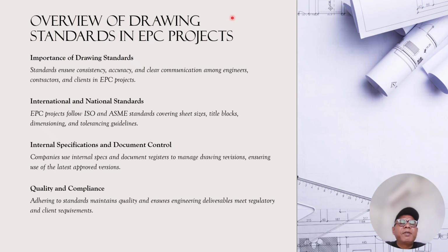So after the coming of EFC, if there is any change, the EFC drawing has to be updated. It is not only updated on the EPC side, because to make the EFC we need to consider a lot of information from the manufacturing. So the revision of drawings and very intense communication are very important, to make sure the drawing is the latest as per the actual situation on site.